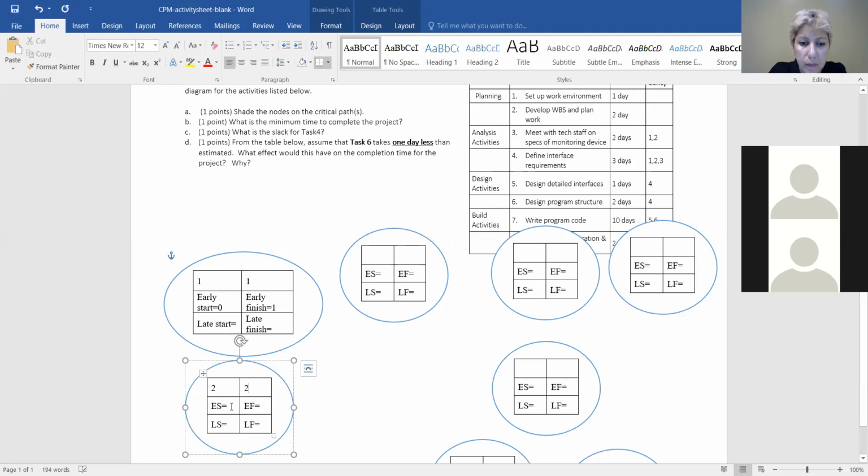I have a question for you, Dr. Lai. Since activity 4 is requiring 1, 2, and 3, and activity 3 requires 1 and 2, can we just do for activity 4, it require activity 3, since 1 and 2 are prerequisites? It would make our charts look a little better, and since it would have to be implied that we had to finish that activity because they're included. Yes, you're right. That's redundant.